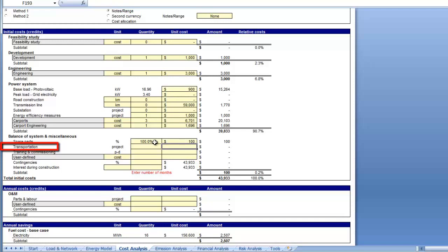However, this project is located in Southern California, where the vast majority of the project equipment should be procured with relative ease. Also, considering that this project is closer to the range of commercial scale projects, we can expect an overall shipping cost at about half the lower range of residential projects.